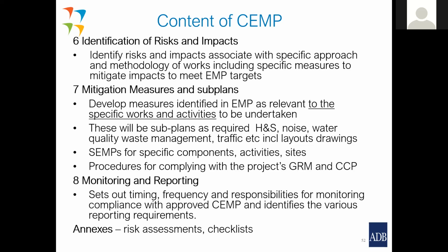So these will include the sub-plans that we talked about before: health and safety plan, noise plan, water quality, waste management plans, traffic control plans, site-specific plans for specific components and activities or specific sites, and then procedures for complying with the project's grievance redress mechanism and community consultation plan. That's really important. The contractor's stakeholder consultation, because that continues all the way through the project.